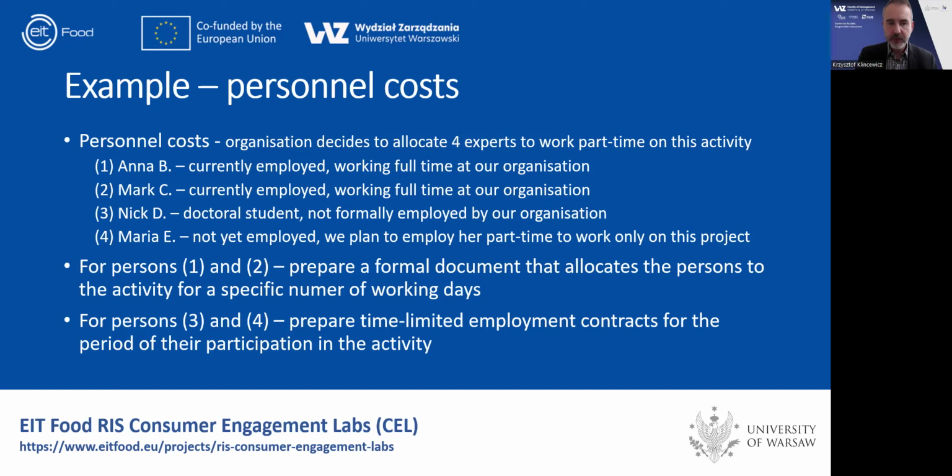In general, it's up to you to define the way of splitting personnel costs. Based on the application that you've submitted, you are obliged to involve certain facilitators who are declared in the application. But it might be that some of those people are currently not employed by your organization, so you will either have to employ them as personnel or employ them as contractors who follow some purchasing procedures. And in general, be prepared that you will need to formally allocate those employees to the project, and also make sure that you report their costs.